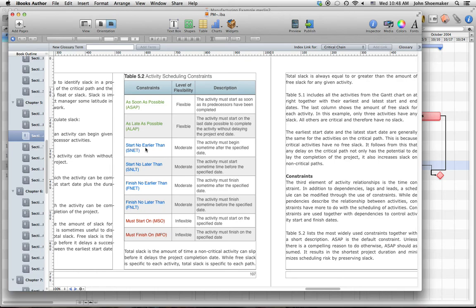Well, wouldn't it be nice if we could spread that work out a little bit so that people weren't exhausting themselves in January and November? Well, that's essentially what these do. As soon as we sign the contract in January, we can order the meals for the banquet, which is first week of December. Well, couldn't we say start no earlier than November 1st? That gives us a whole month to schedule the meals and the breakout snacks and so forth.